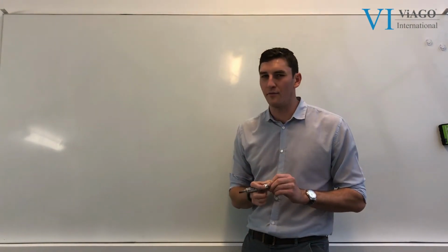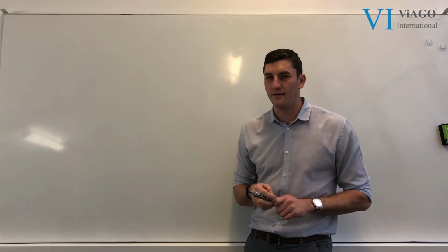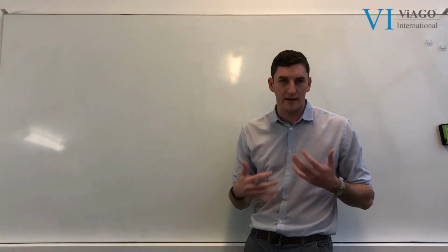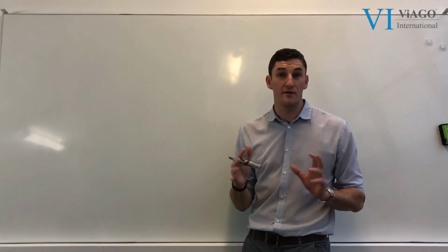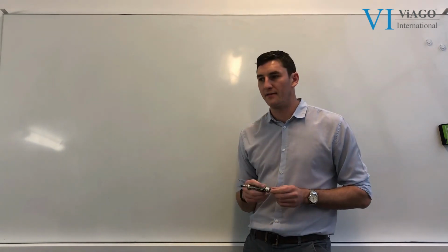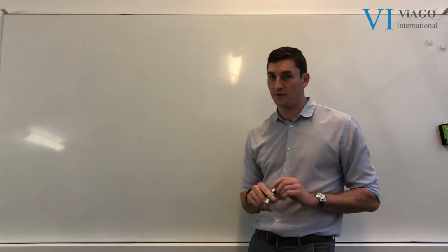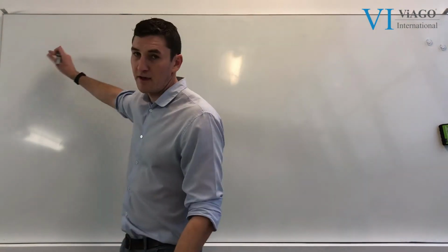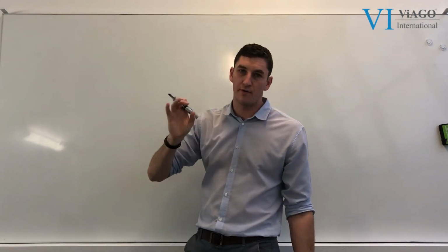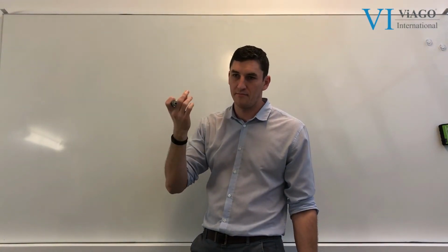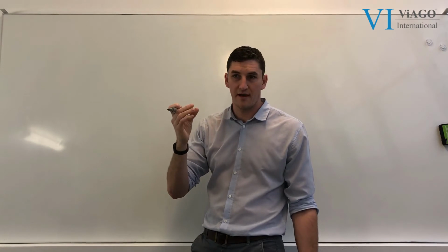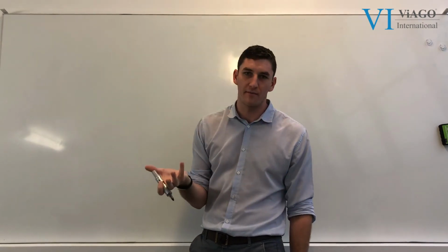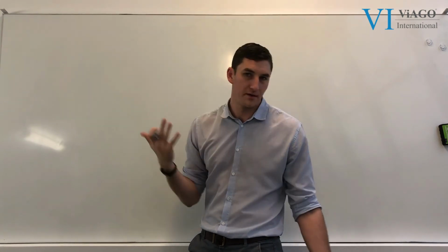It's key to note there'll be one in each process. Sometimes you hear about people going around debottlenecking and looking for lots of constraints in the organisation. In this step we're looking for one, because there's always going to be one bottleneck. As you can imagine with a real bottle, if you had two bottlenecks of different widths, then the skinnier one would actually be constraining the flow out of the bottle, and the fatter one wouldn't really be doing anything.